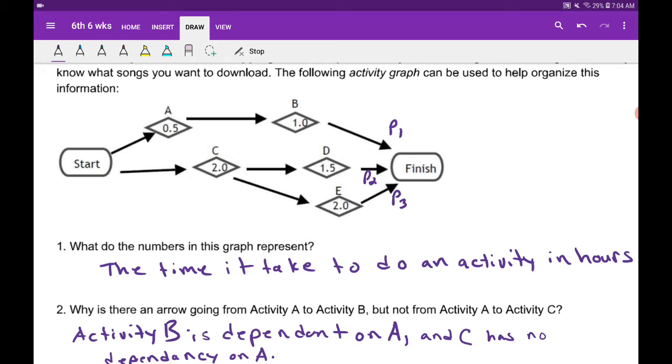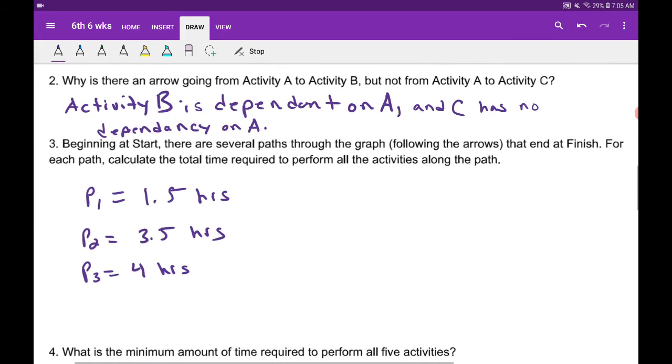so let's say that we decide to bake a second cake, and that puts more time because there's one oven, right? So activity D, you have 30 minutes for extra baking time, right? And let's say it takes an hour for this extra cake you're gonna do, or cupcakes. Well, that is going to bump activity D to 2.5 hours, or makes the whole thing, your longest path now, 4.5 hours. Okay, so now you've just increased the entire time of your project by doing that. Okay, so no longer path 3 would be the longest, it'd now be path 2 if you're going to bake another hour for cakes or whatever. So that's what I was trying to say there, and